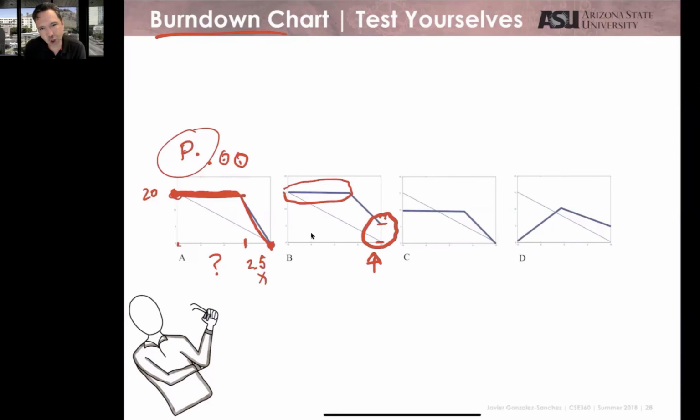But if I take a look at the Burndown chart and I notice this space here, basically it's telling me that for that particular period of time, you didn't finish. And again, in 1 sprint, no problem. I mean, maybe something was too hard to do, maybe anything could happen. But when you have a team, and usually that team does not complete the things, you can start thinking about replacing some members of your company. Like, these guys never accomplish things, never finish things. Yeah, the pattern becomes a problem. I agree.